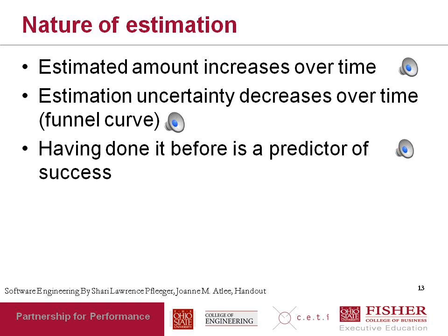And finally, the greatest predictor of successful or correct estimation is having done that kind of project before. So for example, if you've built a website before, then your estimations with respect to the next website that you want to develop will be more accurate than if you haven't built a website before. Once again, the reason for this is pretty obvious. If you've done it before, you have a sense of what it might take, therefore your estimates are likely to be better.